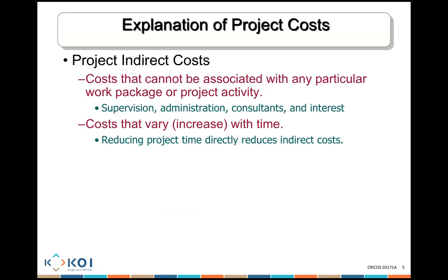For example, accounting costs relating to paying the bills associated with the project. You might have consultants trying to manage or guide you on how you go and implement the project. They're not doing the task themselves, they're simply guiding you. The shorter the project, the shorter you're going to have to pay them. You're going to have money you are actually paying for to get the project. You pay interest on that money. You finish the project earlier, you earn your money earlier, you'll be able to save your costs associated with that specific project.